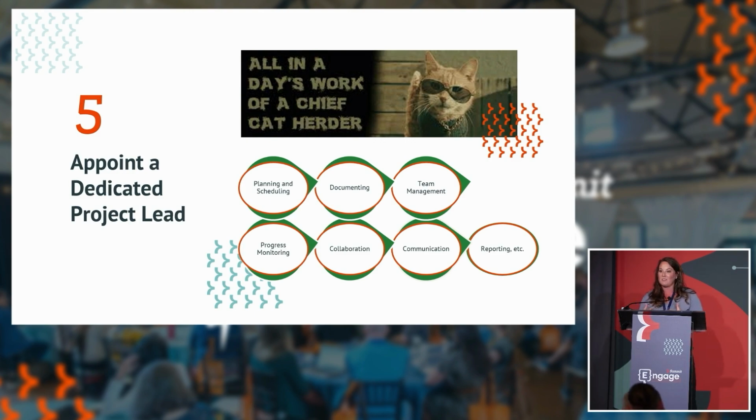It became more of a challenge for us because we were training the consultants on our processes and what we were doing in our college, in addition to learning Element, and that was very hard. So if you have the funding, I know that's not always key, but if you have the funding, hire a project manager, somebody that knows your institution, somebody that can help move this project.